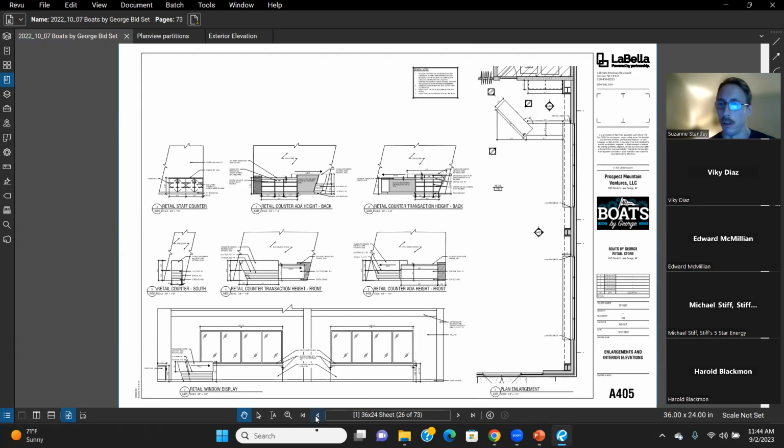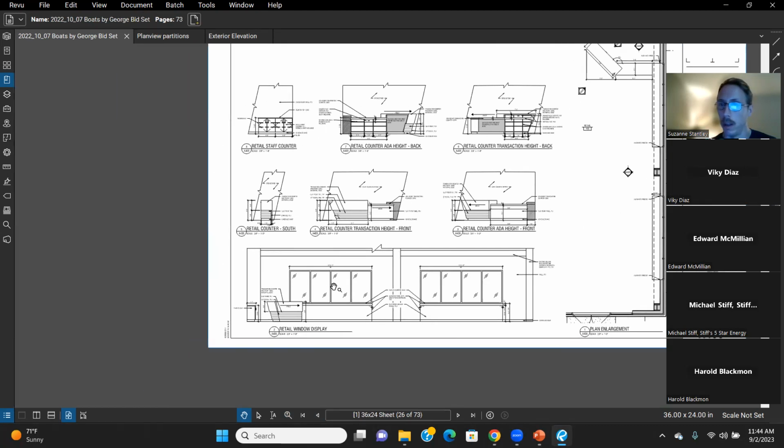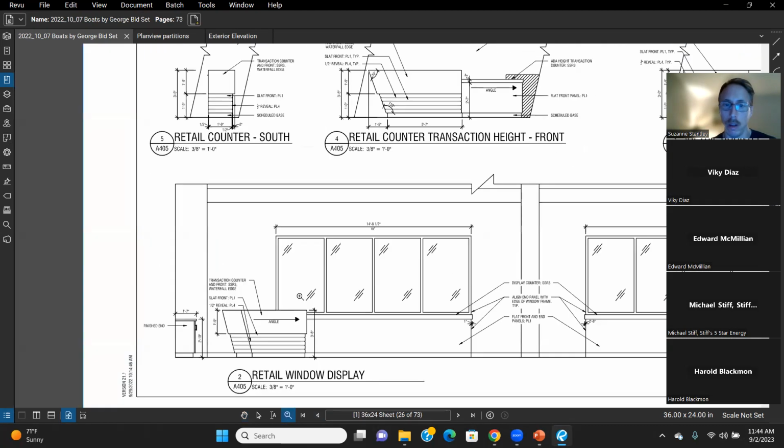So that's why when you're a finish contractor, these are really going to be specifically for painting, I should say. If you do interior painting, your interior elevations are going to be more your bread and butter than probably the plan views because you can actually get square feet from a takeoff using these. And again, we're going to go over it more, but this is all to scale.